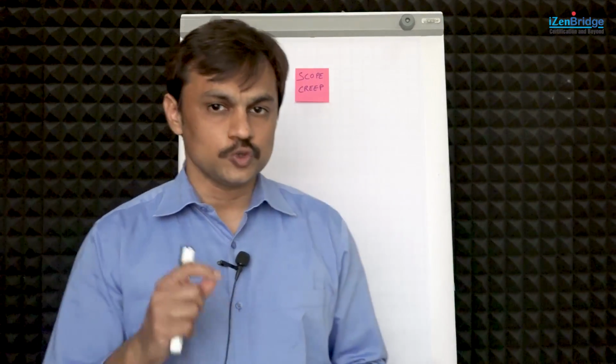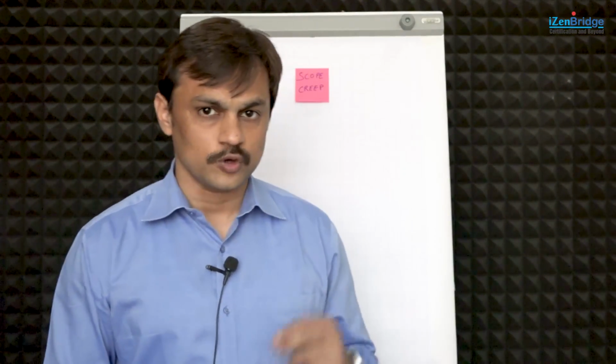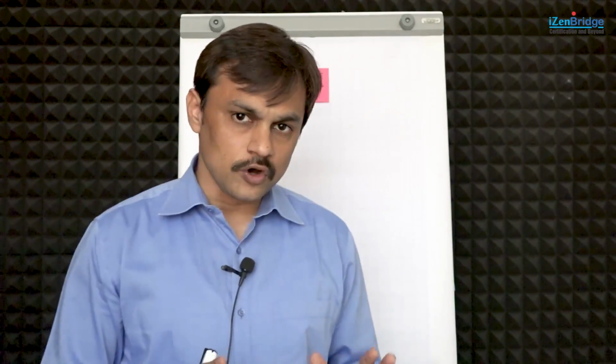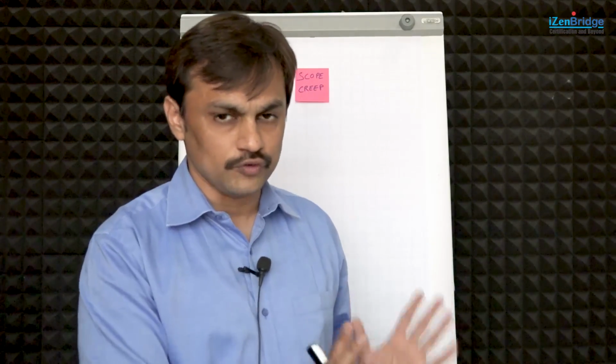So as a project manager, we need to put processes in place so that we avoid or control scope creep. So let's look at the tools, processes, or mechanisms we apply to control scope creep in the predictive way, and then we also talk about the adaptive way. In a predictive life cycle, we focus on converting requirements into a scope, and we create a scope baseline. The scope baseline becomes an approved version for the project team to refer to, and it also becomes clear guidance that we need to do this part of the work only.